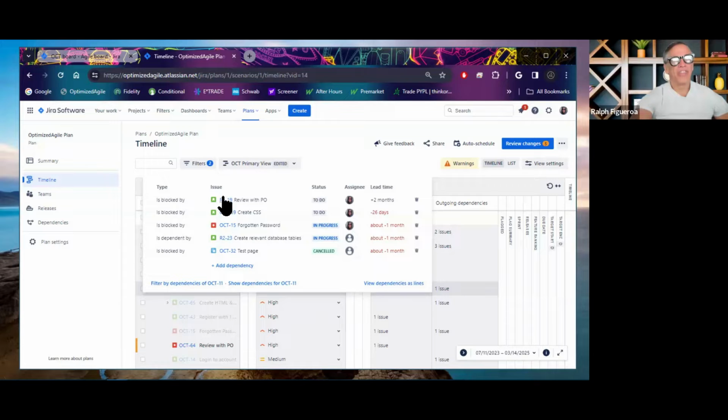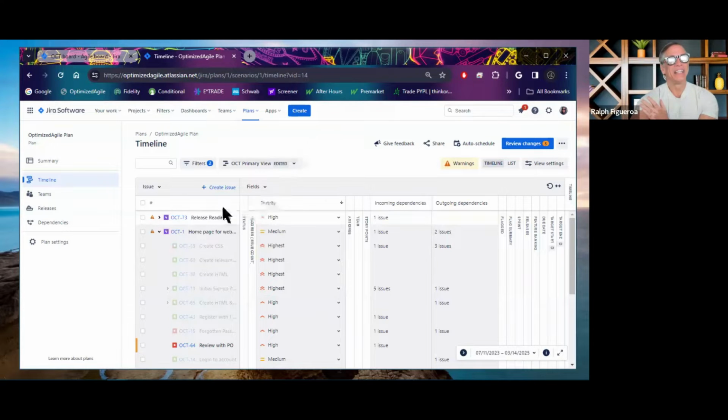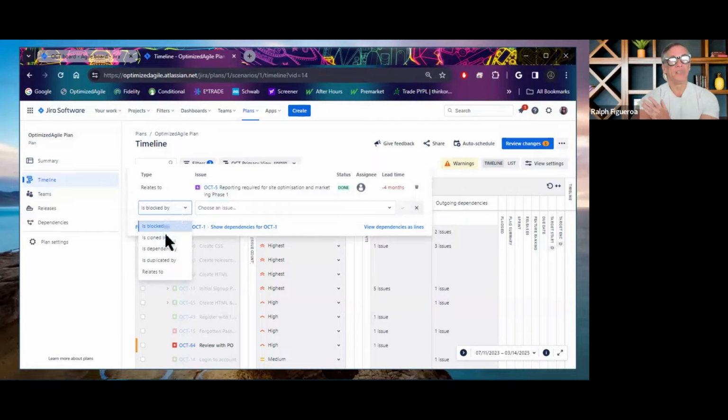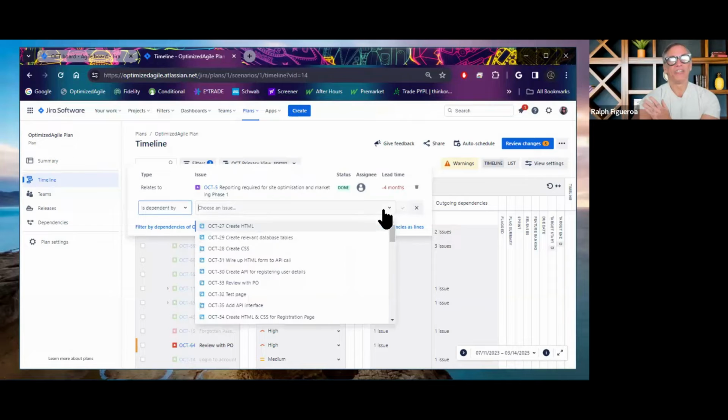And by clicking on that dependency down arrow, you can see all the dependencies across different issue types and across different projects. So there's no restriction. For example, in this case I have a subtask that is part of a dependency to a story, but I can just as well have a subtask or a story be a blocking issue, or dependent on this epic.